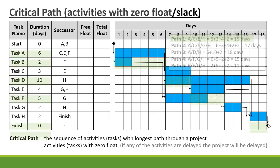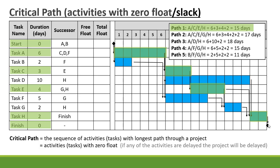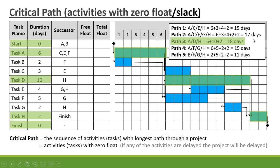Let's calculate the duration of each path on the Gantt chart. Path 1 is A→C→E→H: 6 plus 3 plus 4 plus 2 equals 15 days. Path 2 is A→C→E→G→H: 6 plus 3 plus 4 plus 2 plus 2 equals 17 days. Path 3 is A→D→H: 6 plus 10 plus 2 equals 18 days.